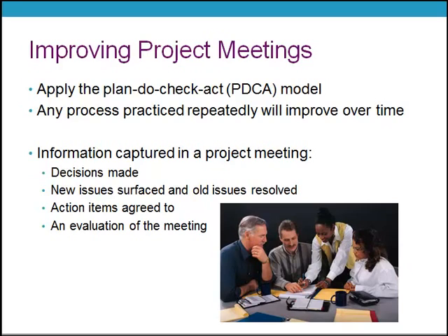Prepare minutes, or better, delegate to a note taker. Check, that is, evaluate the meeting, which we'll discuss shortly. And finally, act, complete tasks in between meetings and ensure that others do likewise. At the end of the meeting, it's helpful to note action items to perform by a specific date.